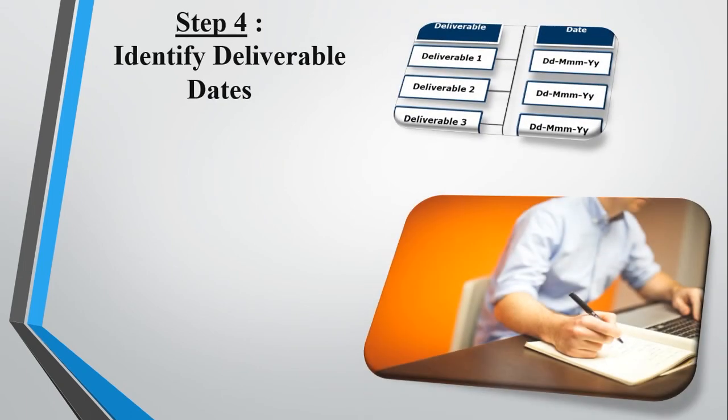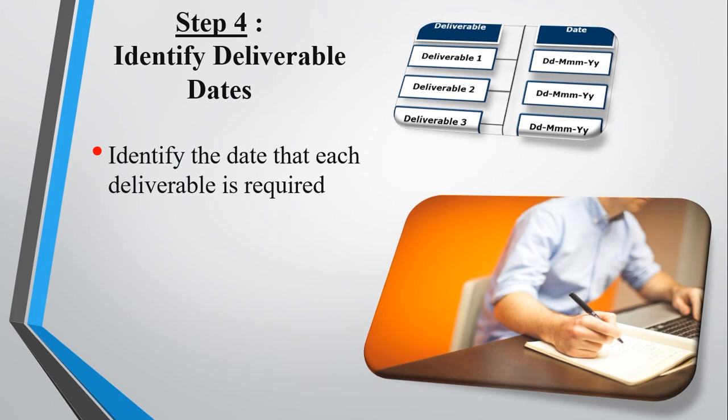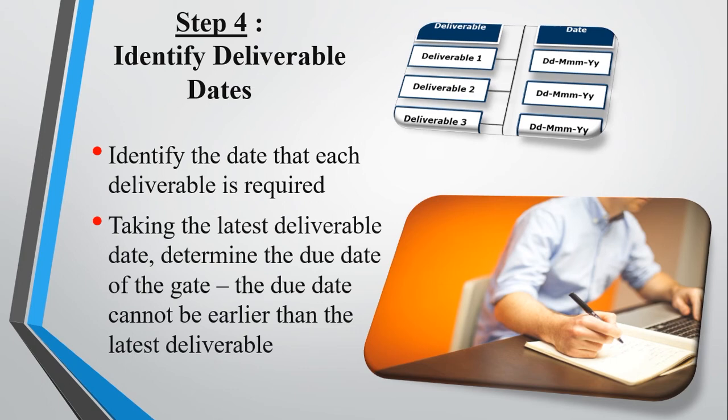Step 4, identify deliverable dates. Now, this is something I do, right? And when I look at the plan, I go, based on the current plan, I will have a date in there. That date, depending on how you have planned the project, may have an element of float in it. So, do I want to push that activity to the very late period in terms of a late start or a late finish? No. The thing I've driven my team with is looking at that baseline data as provided, looking at the applicable float, testing that deliverable with my engineering team, testing it with my procurement team in terms of confidence, and establishing a realistic date, which is usually before the baseline date or usually before the late completion date, such that I have a clear date that if I miss it, I have the opportunity to recover.